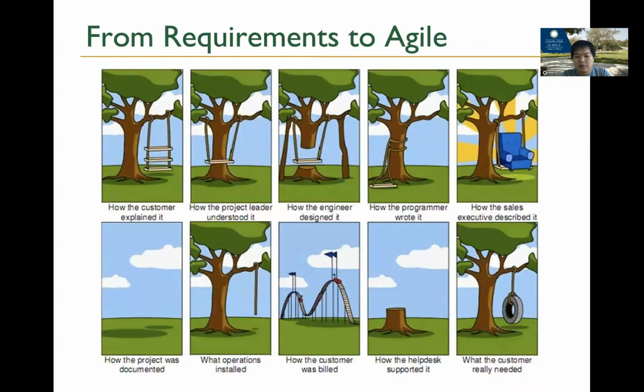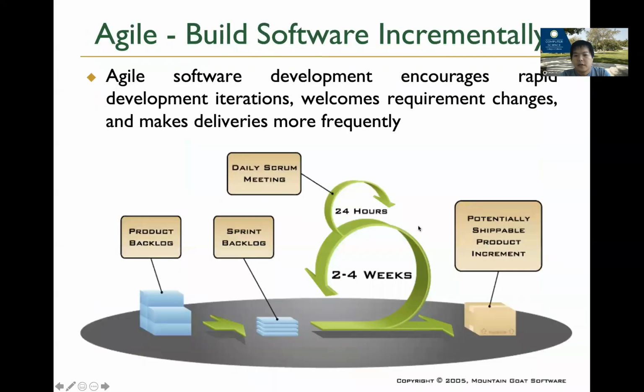So this is the problem we're trying to get rid of from the waterfall model. We don't want you to spend the whole year building something that's either not really needed by the customer, or the customer just gave you the wrong requirement in the very beginning. That's why we told you that you should break up your big cycle into smaller cycles, and in every cycle, instead of focusing on all the features, just focus on 10% of the features, maybe less.